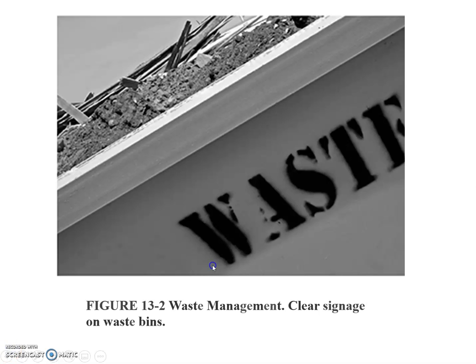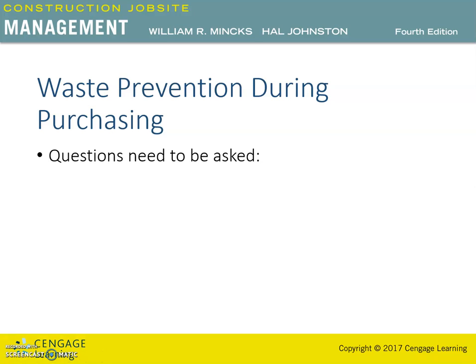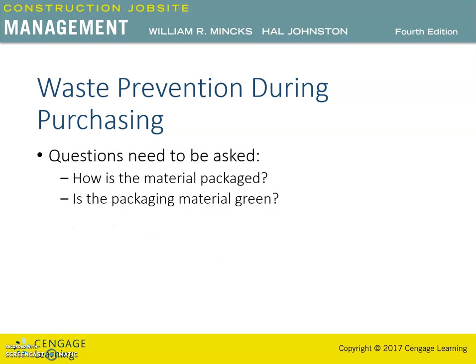In the construction process, waste prevention during purchasing is also quite important. Much waste prevention can happen during the purchasing process. There are many questions one can ask. For example, how is the material packaged? The packaging of the material will affect the generation of the waste. Is the packaging material a green material? Can the packaging material be used in other ways?